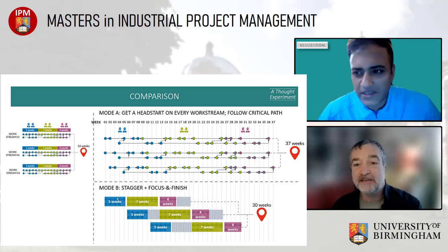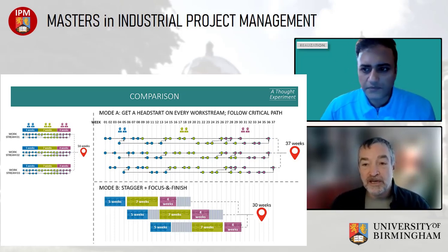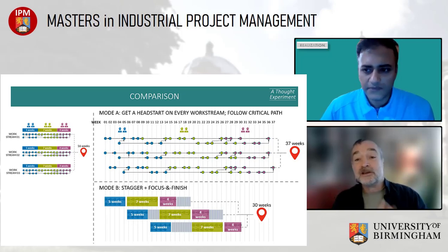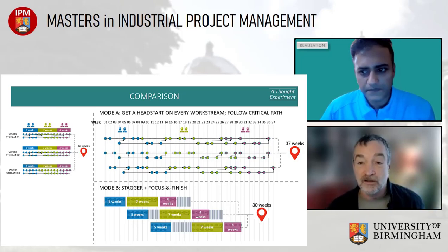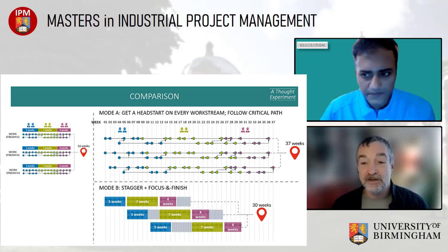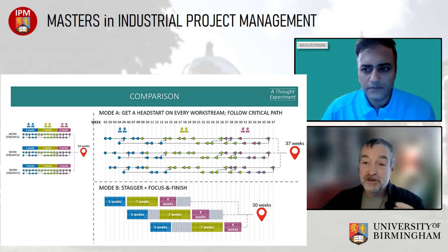Yeah, and the project management team focuses on the flow between the tier 1 boxes, but it still expects the tier 2 to be well managed. But you don't try and do it in one single scheduled and controlled environment. In effect, you're decoupling the work so that you reduce the noise that's seen at the project level, and when they see problems, they can be sure that it's a real problem, not just normal day-to-day variation and emergence.